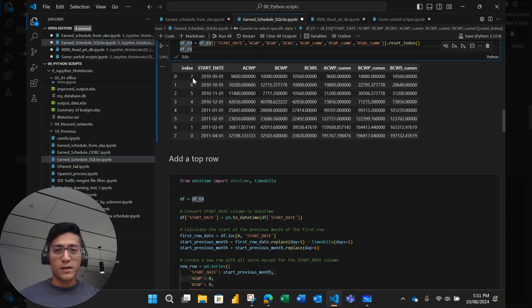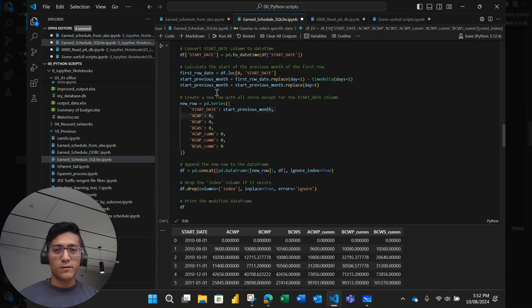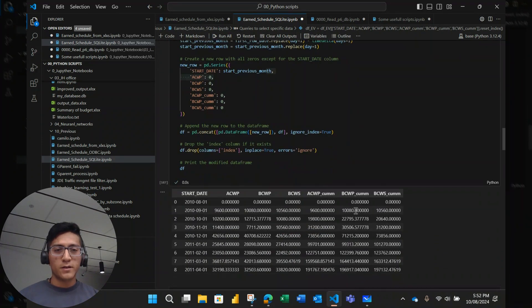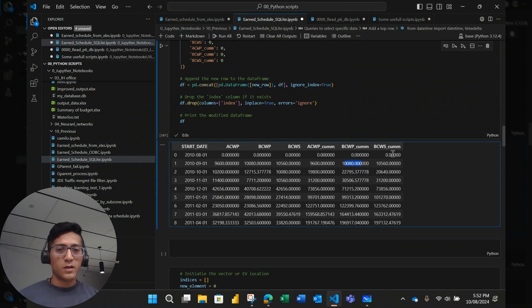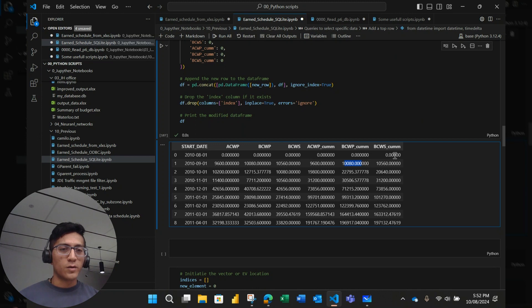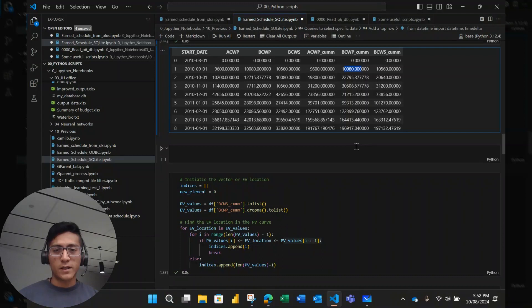Additionally, here in the row number zero, I'm going to add a row in the top with zero values. And then to be sure that the first earned value, maybe it's lower than the first planned value. So it has a lower value to calculate the future, the next earned schedule.